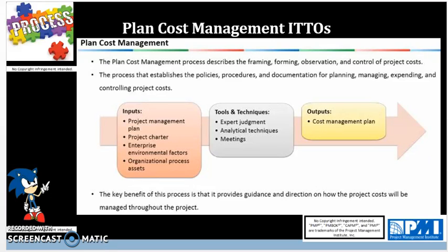Next, we have tools. We have meetings, which are used to go over lessons learned from previous projects and plan the cost accordingly from historical data and SMEs in the project management office. The cost planning meeting should be very thorough to give all stakeholders a clear picture of the expected cost of the project, and by the end of cost planning, we must get the cost baseline signed off by all stakeholders, especially the sponsor.